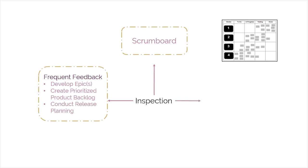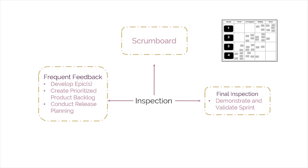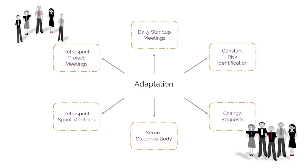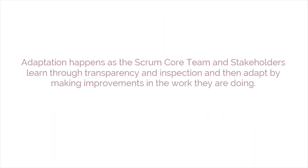The final point of inspection comes during the Review Meeting, when the team seeks approval of the deliverables by the product owner and the customer in the Demonstrate and Validate Sprint process. The third main characteristic of Empirical Process Control is adaptation. Adaptation happens as the Scrum core team and stakeholders learn through transparency and inspection and then adapt by making improvements in the work they're doing.